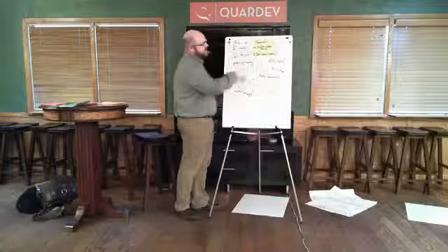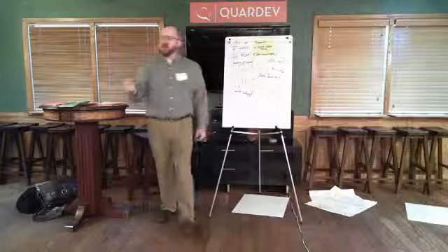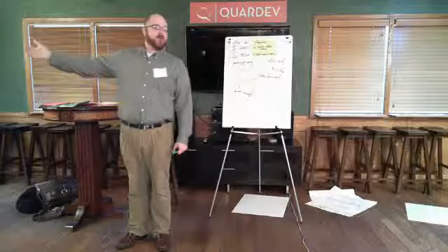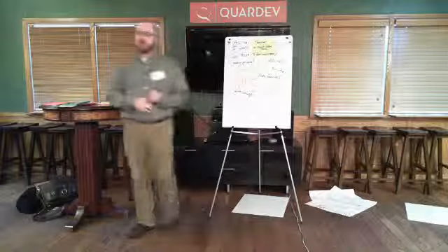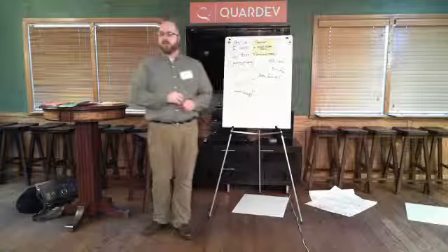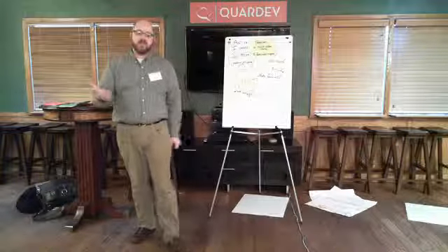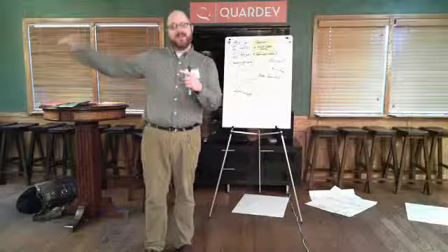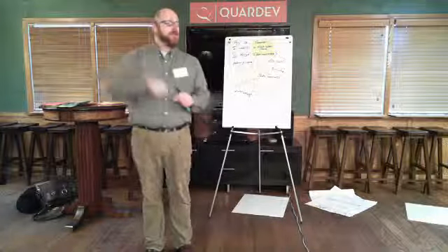And the reason it's called acceptance criteria is we're really asking, what are the criteria you're going to use at the end when I ask you whether you accept this or not? So that's the beginnings of that. Could you rephrase that as what is the minimum criteria? Yeah, I think that'd be valuable. Because you could add extra stuff that impresses them and they like it, but it wasn't part of the criteria. And that could lead into a conversation about, do you want to do that now instead of the rest of the stuff we've planned? Or would you like to do that later, with preference towards probably later, and there's other stuff to get done?